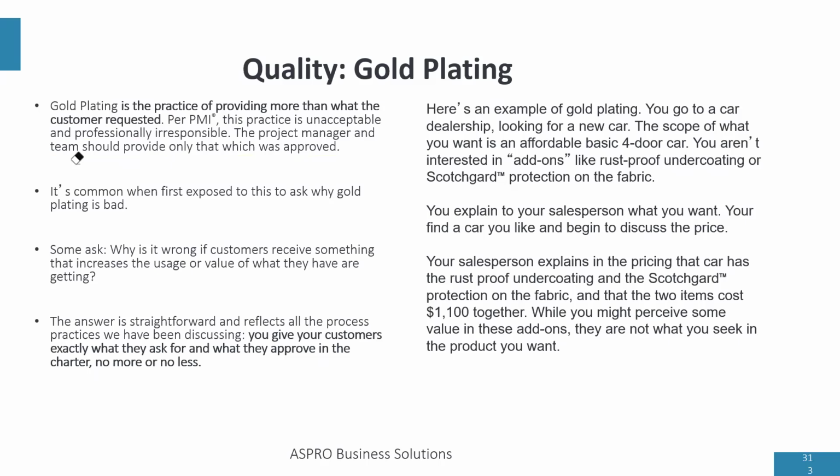What we can do, which is allowed, is if you think the customer will benefit more based on your experience as a project manager with similar projects, you tell them that it's possible that they can get more value if they include this in their project. If the customer accepts and now requests it, it's no longer gold plating because they requested it. But we must not use our own experience and say, oh, this is what the customer must like, and do it. Even if they like it, that doesn't make it right as a project manager. You've just done something not professional. It's unprofessional to gold plate.